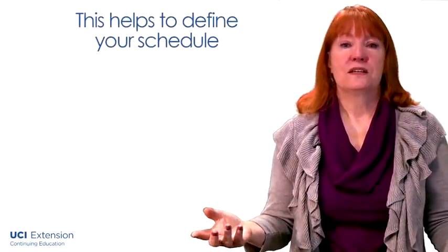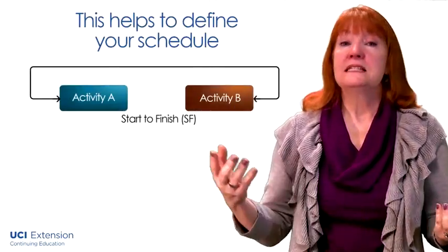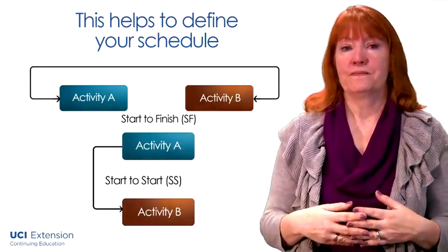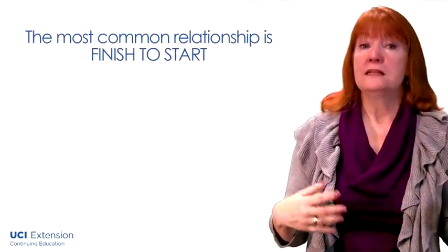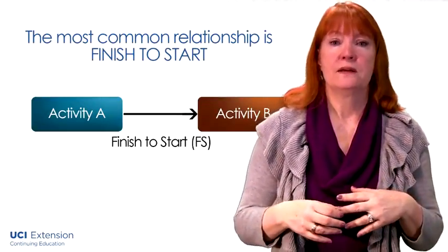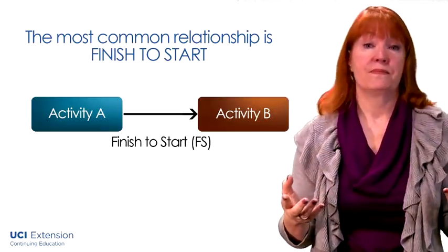Why does all that matter? This helps to define your schedule, and the amount of time it takes for two activities in a start to finish relationship is different than if those two activities were in a start to start relationship. The most common is the finish to start relationship. In fact, most project scheduling software tends to default to finish to start unless you tell it otherwise.